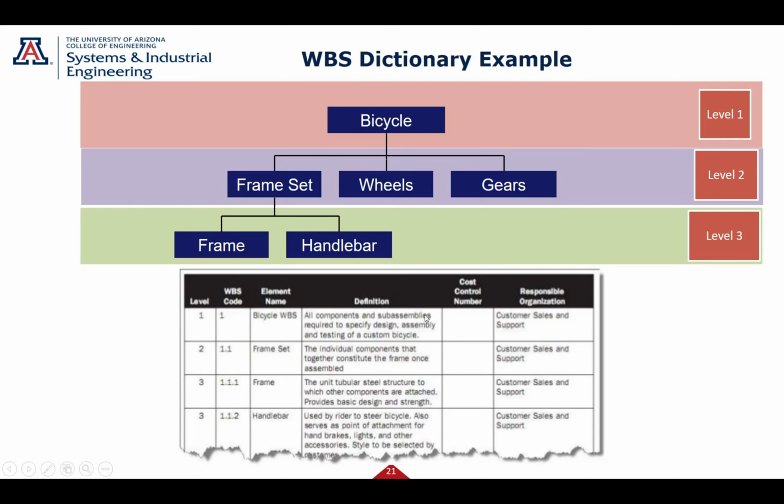So the dictionary is written to help you understand what can't be in the figure. And lots of times you'll put the responsible organization in there too. Dictionaries have different forms depending on your organization, but as a minimum they're described in these boxes, and it's usually delivered with your WBS.